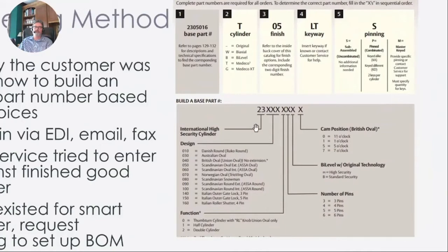So the problem with the plan was even if we implemented SKUs, we still had some challenges. We still had to convert hundreds of thousands of item numbers, bills of material, and routings from the old system to JD Edwards. And a lot of the bills of materials were wrong. They were old, hadn't been used in years, maybe decades, and the routings were different. Maybe they put in more automated lines on the floor to make the product, and some of the old machinery that it referred to in the routing just wasn't even correct anymore.